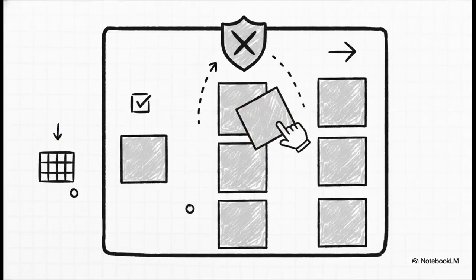And under the hood of this sleek interface are features that genuinely dictate a better way of working. It boasts incredibly fluid, loop-free drag-and-drop mechanics. But honestly, the true game-changer here is the work in progress, or WIP limits. The system will actually warn you, or literally block you, if you try to stuff too many cards into a single column. It physically enforces focus to prevent workflow bottlenecks.